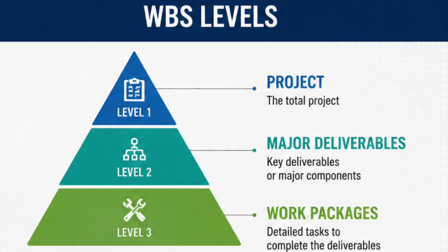Then you'll be having some manufacturing-related deliverables. Then you'll be having the installation documentation part. Then the next WBS we can have is procurement. Procurement is whatever materials you're going to procure for that particular project. So that all comes under your procurement WBS.